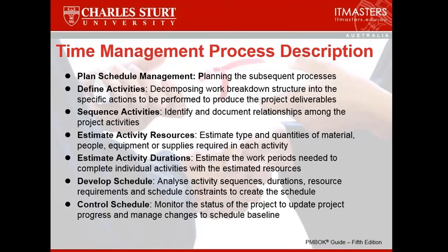We may have had some more wet days on the construction site than we had anticipated. So the assumption was it was going to be 20 wet days, but it turns out to be 40. So the customer will have to recognize the fact that extra payment has to be made to the contractor.